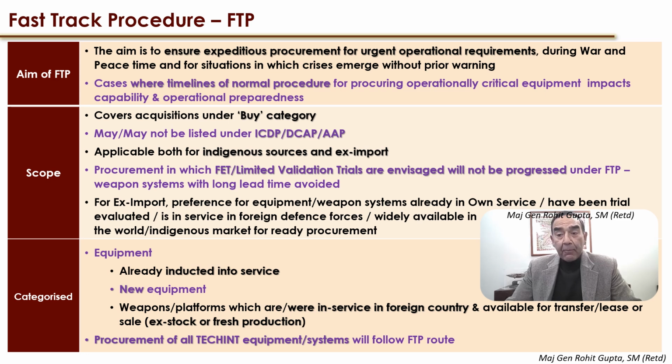Now, for FTP import, the preference for the equipment or weapon systems are those which are already in service with our country and therefore can be procured as part of the repeat orders or as a fresh procurement. They have been trial evaluated, may not have been inducted, but they have been trial evaluated. These products are in service with the foreign defense forces and the capability and the performance is known, and they are widely available in the world, or even in the indigenous market for ready procurement.